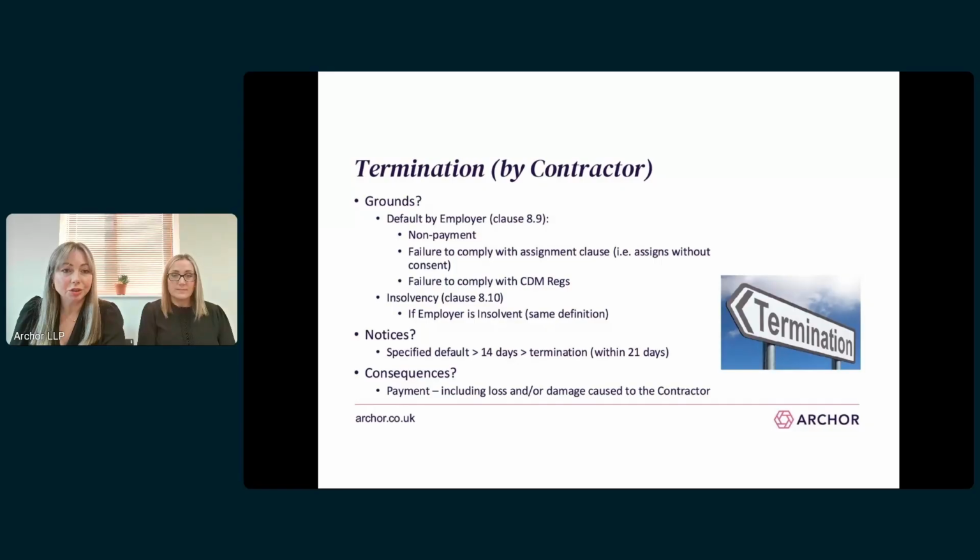Then no later than 2 months after termination, the contractor needs to send all documents to the employer to allow the employer to prepare the termination account. The employer then has 3 months to prepare this account and send it to the contractor. And the due date for payment of the sum in that account is the last date for the issue of the account itself. So maximum 5 months after termination.